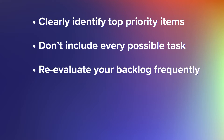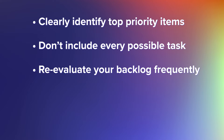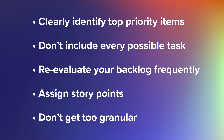Re-evaluate your backlog frequently. Check that every user story is still important and relevant. Mark items as complete when the work's been shipped. Assign story points to indicate the level of effort rather than estimated time required to build a product feature or resolve a bug. Backlog items can be super granular, but they don't have to be — tasks are usually broken down more thoroughly during the sprint planning process.